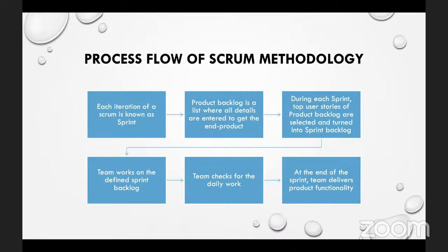Sprint backlog pretty much are stories from the product backlog that we have prioritized, right? So the sprint backlog is not some strange or some new type of backlog, but it is just some of the feature sets or the user stories in our product backlog. That is what we've selected and we've prioritized, right?